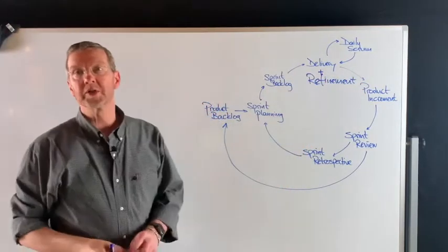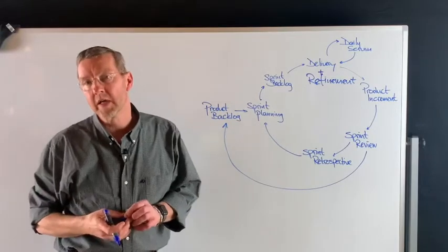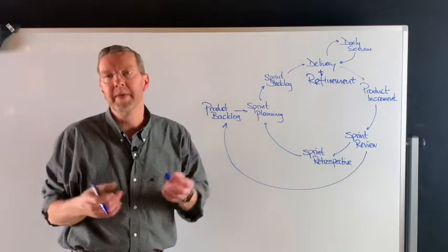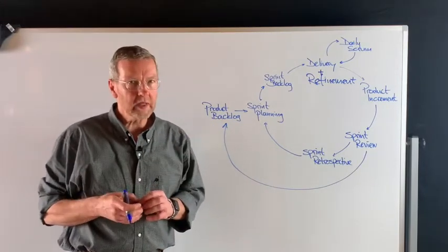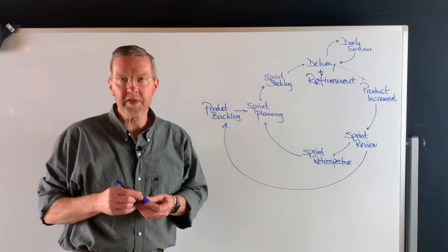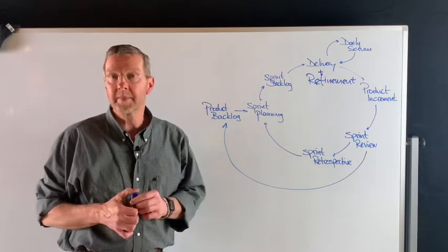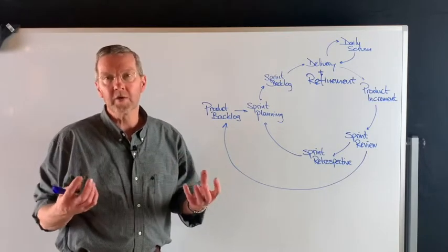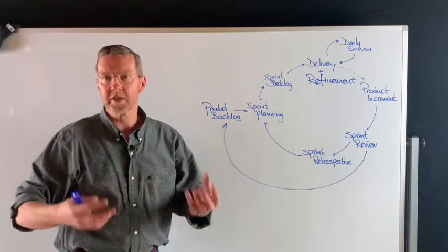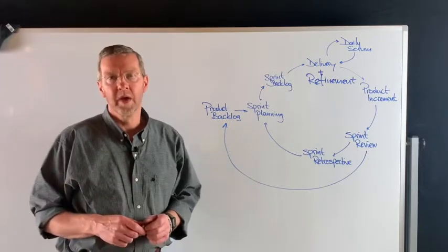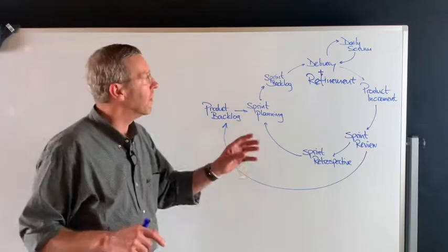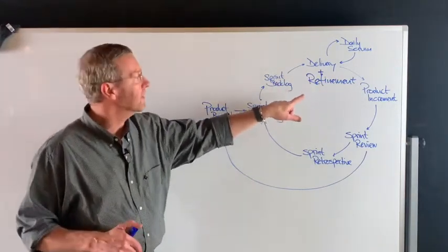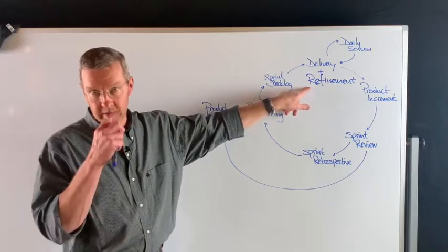How much work, how much time? As much as necessary. If it's something as simple as a first version of that cap, maybe a few hours. If it's something really complex where a group of very different engineers needs to collaborate, yeah, you might spend a number of hours there. You need to design, you need to detail out before you can do the work. So it's not a waste, it's not an overhead, it's not a loss. So that's refinement in the small. While scrumming is going on, there's refinement looking just a couple of weeks ahead.